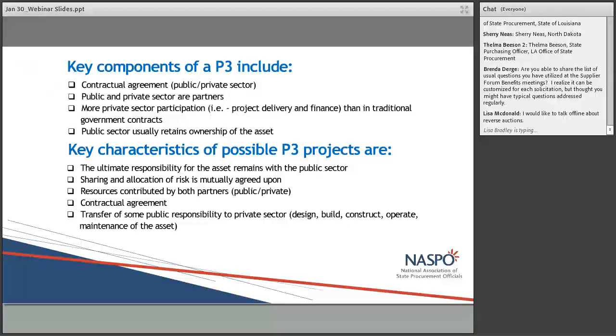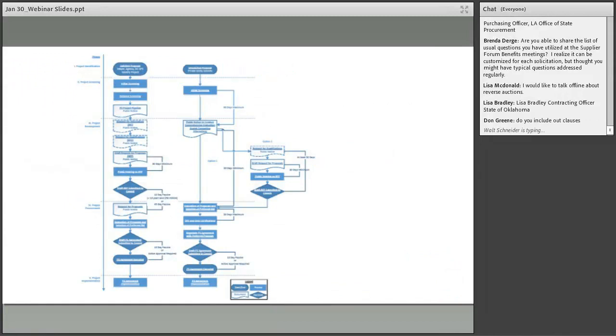In the unsolicited approach in the district, the Office of P3 has a certain period of time where they're designated to open the floor, an open window for receiving unsolicited proposals from the industry for projects they think are viable that we might be interested in with regards to our infrastructure. The process at that time is that it is reviewed by the agency and by the stakeholders, and then if deemed approved, there is an opportunity for the industry to receive alternative proposals to best the unsolicited proposal.